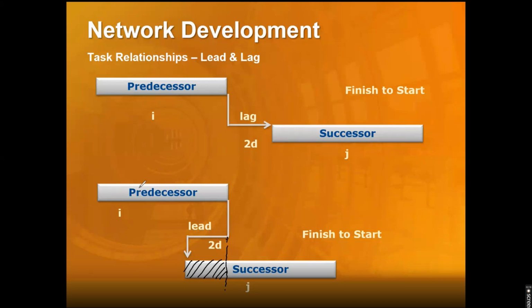Ideally, say this was the class which was going on, and then we would have declared that on this day it's an exam day. Practically, we would have started the preparation to get the printers, the paperwork, and all those things. But while this was going on, we know this is the work we will be doing before we conduct the exam. That work was probably a 2 day job, and this could have still been done while the training was going on. We did this preparation work early, so the day the training got over, we were ready for taking the examination.